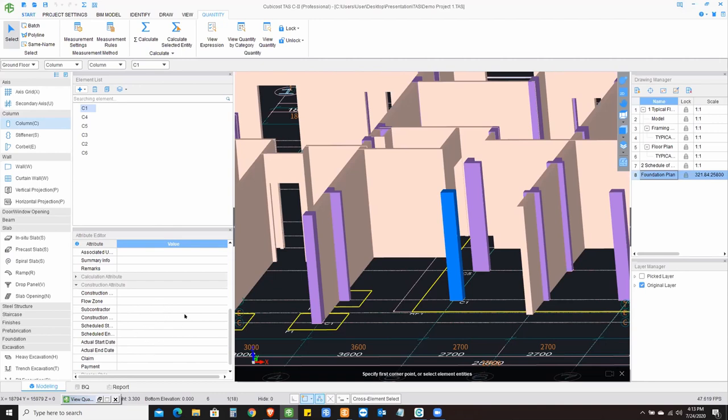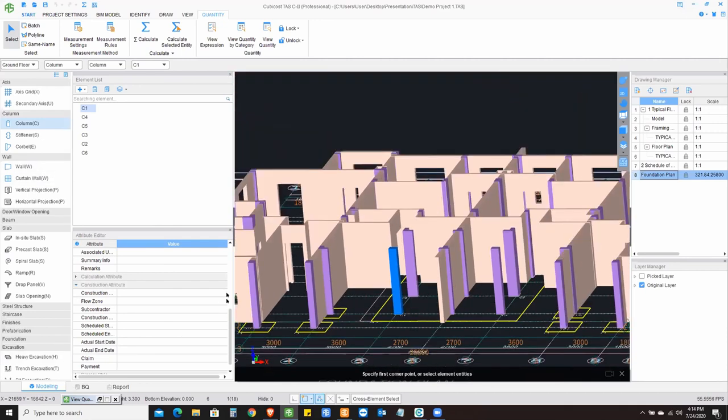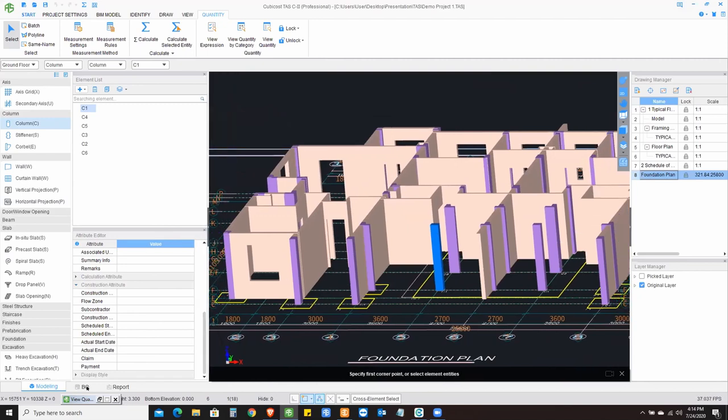This will give you a categorized view of quantities for each of these elements. If you want to do some variations, then you just make changes. And like I showed you, you can set up variation 1, 2, 3, 4. If it is interlinked with the TBQ, then it reflects in the total amount of the project. It is automatically adjusted there. So all of these adjustments can be done in the post-contract stages.